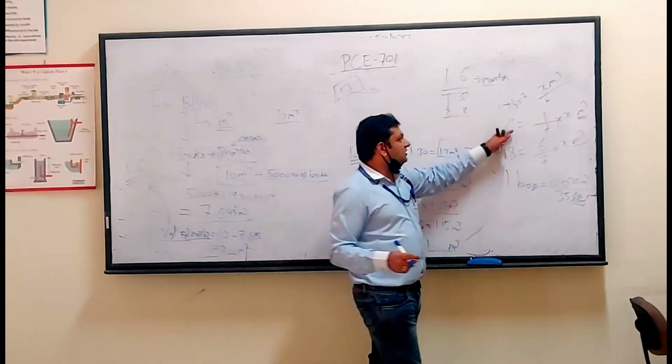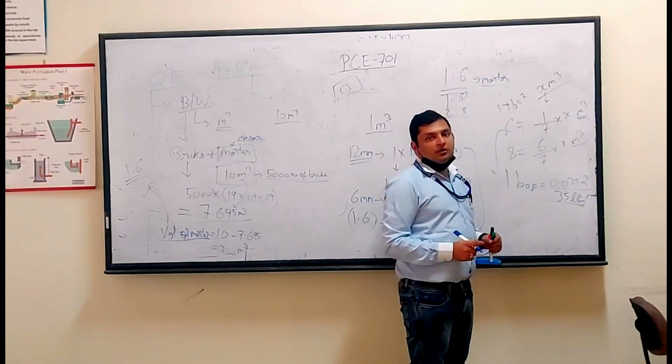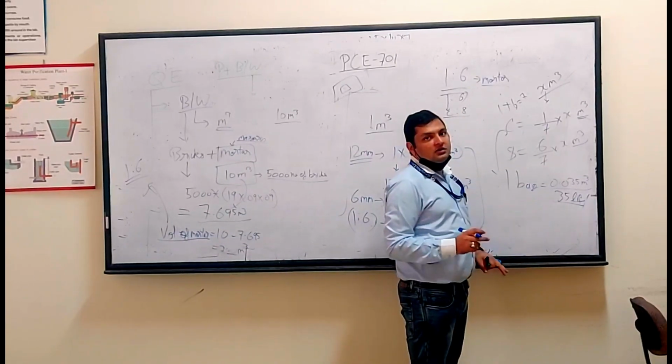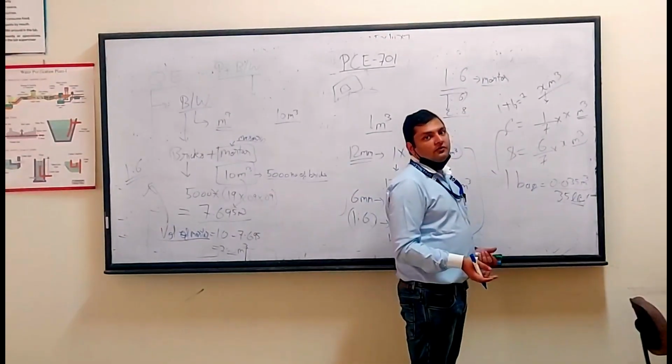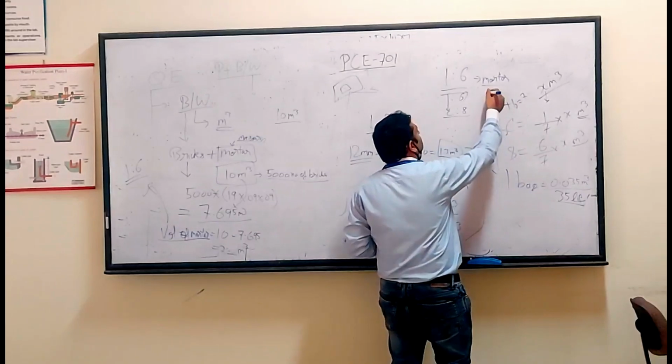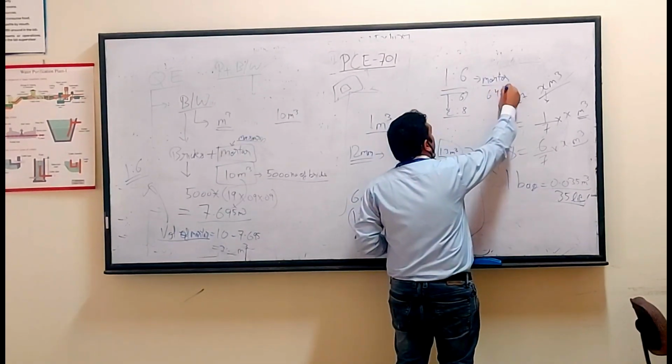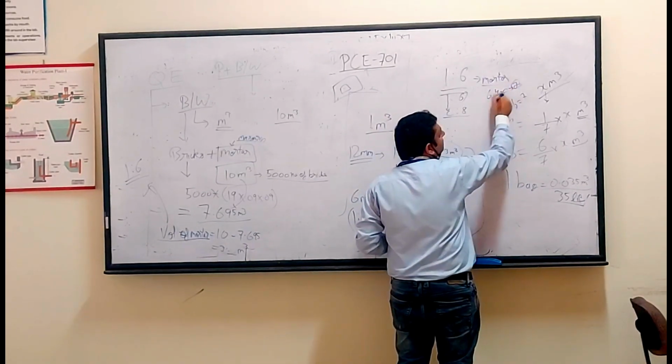Using this, we convert the x by 7 cubic meter of cement to the number of bags. Make it to the next round figure quantity. The bags come out to 6.4. The number of bags to be ordered should be 7 because you will be getting 0.4 of a bag.